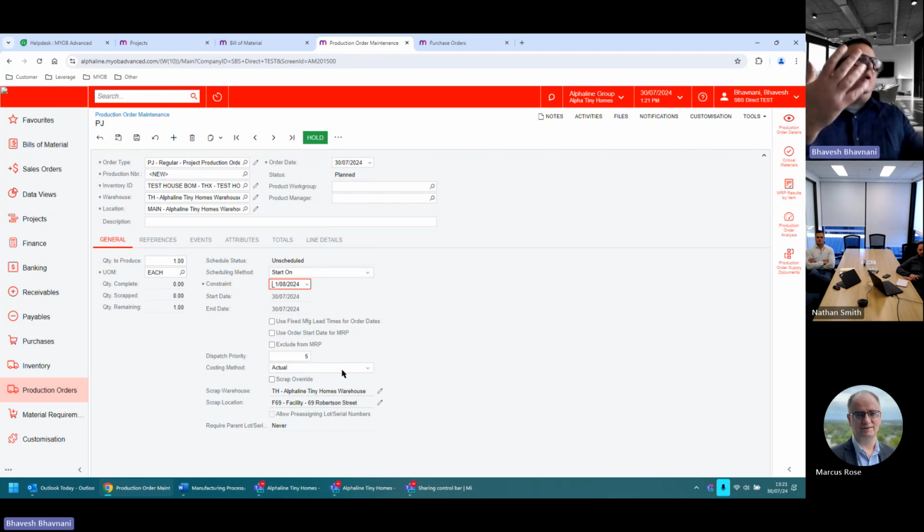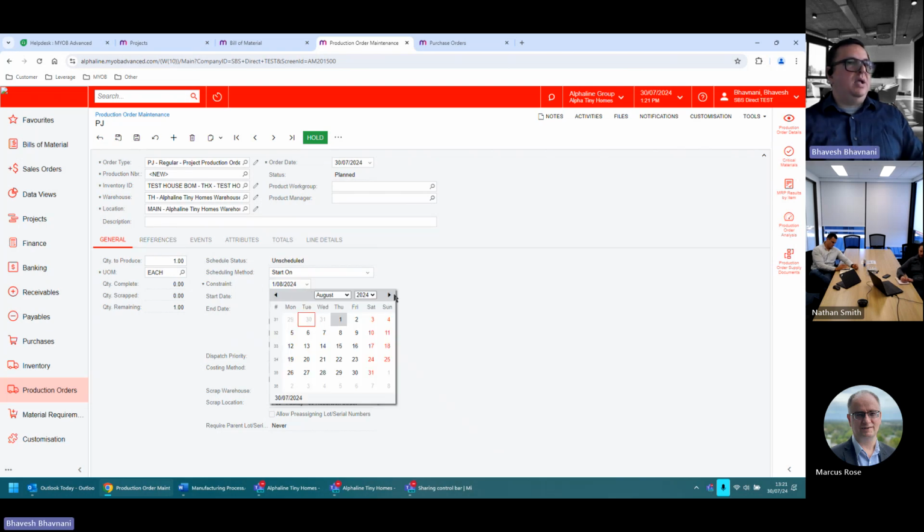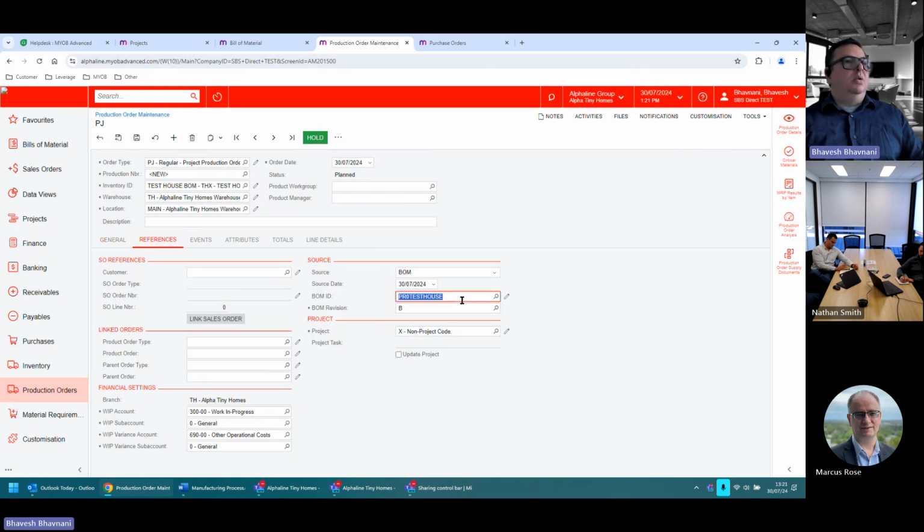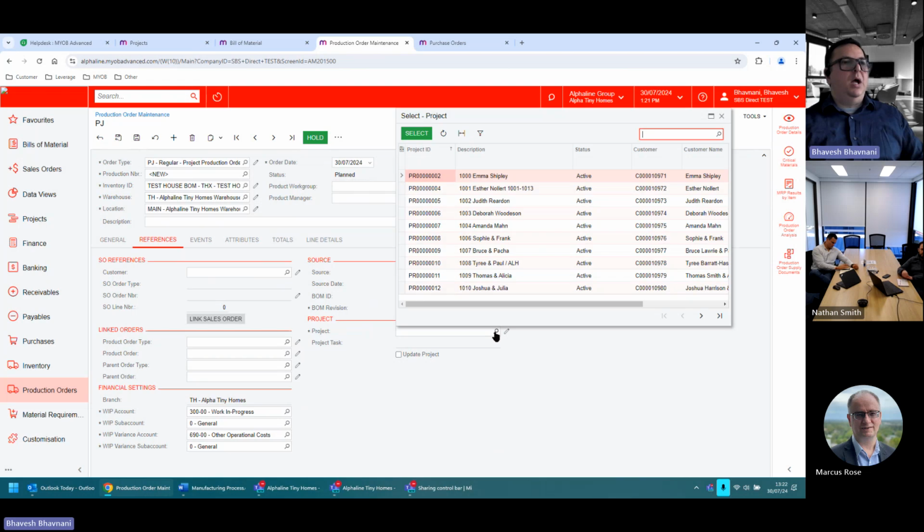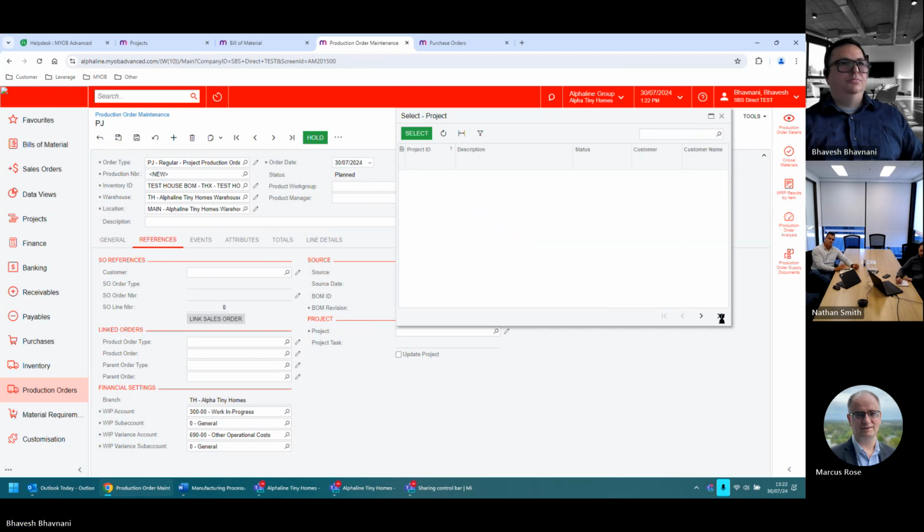Obviously, it won't be so early. In your case, you'll be planning maybe 3 months in advance or 4 months in advance. But let's presume I want to start it on the 1st of August. And over here, the BOM ID, I will change that to the BOM that I have created. And here I will link it to my project.